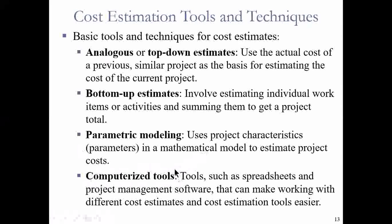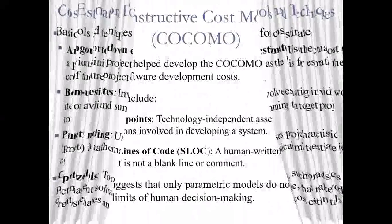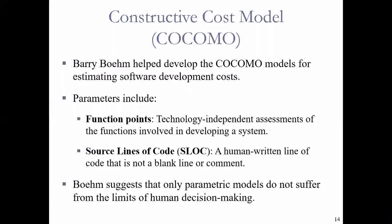Things have become easier with computers. You use tools such as spreadsheets and other software packages that can estimate costs for you. As you learn in project software management, you will learn how to do all this costing with just the click of a button. There is also COCOMO — the Constructive Cost Model — which is very important and helps many project managers complete projects without difficulties. COCOMO was developed by Barry Boehm, who was a software engineer specialized in project management.